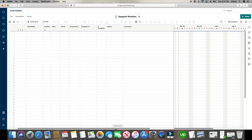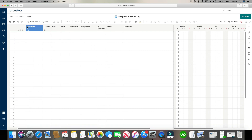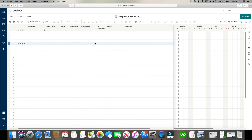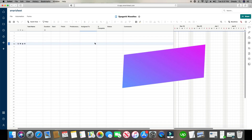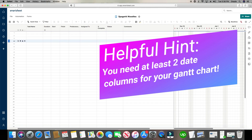Now you can see all the components in the spreadsheet: task name, duration, start and finish date, predecessor, assigned to, percent complete, status, and comments. You don't have to use all of these columns, but the two you definitely have to use are the start and finish date — the chart has to have at least two points of date data.